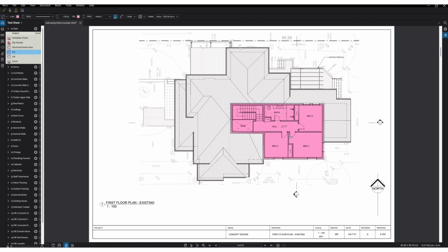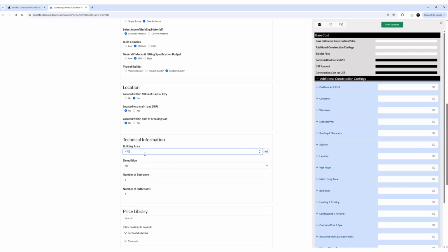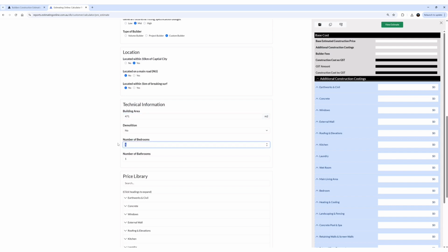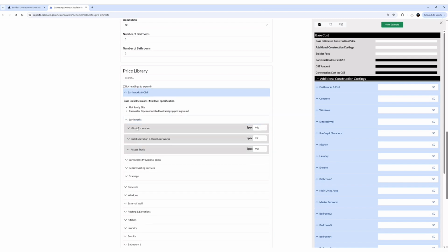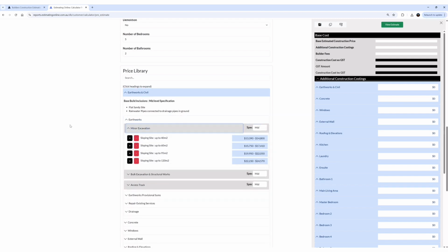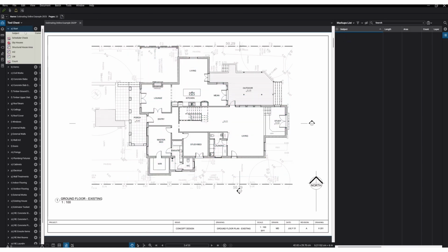As we've selected a double story house, it's going to allow for scaffolding, it's going to allow for one staircase, and any other requirements of steel that might be situated inside the slab. Because we did say this house was sloping, we're going to take a rough measurement of the total square meters of the approximate area of the build that is going to be sloping.